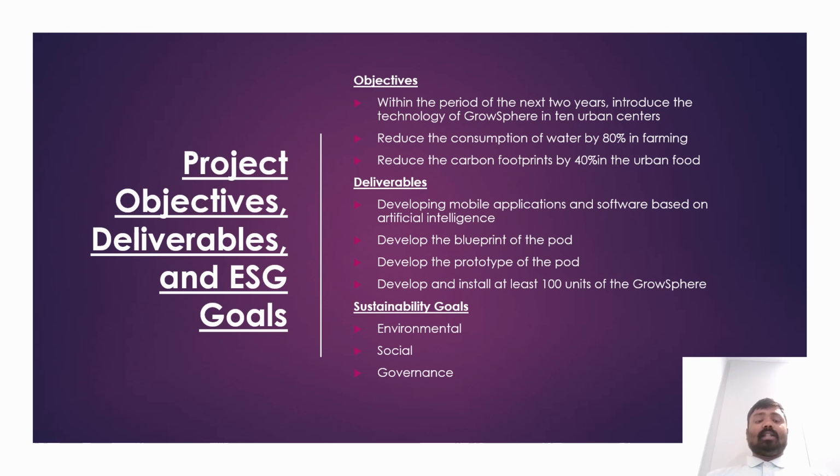Let's zoom in on the first lane: initiation and needs assessment. I broke this down into four sub-steps: stakeholder workshops, where we gathered input from city planners, community leaders, and potential investors; baseline suitability audit, assessing existing urban farming benchmarks in target cities; risk and opportunity analysis, mapping environmental risks like water scarcity and social opportunities such as urban food deserts.